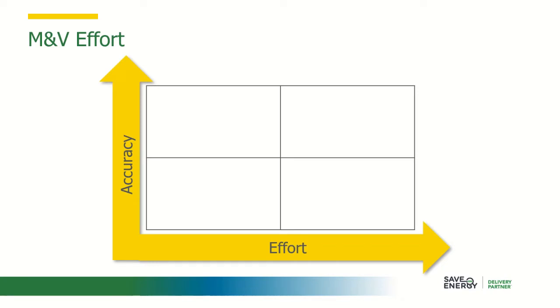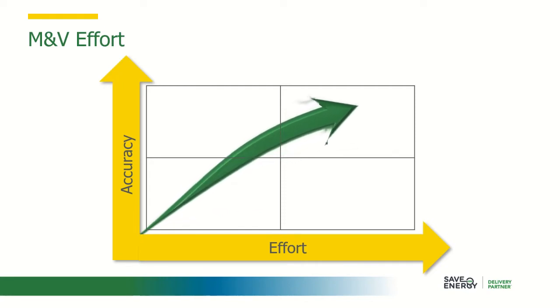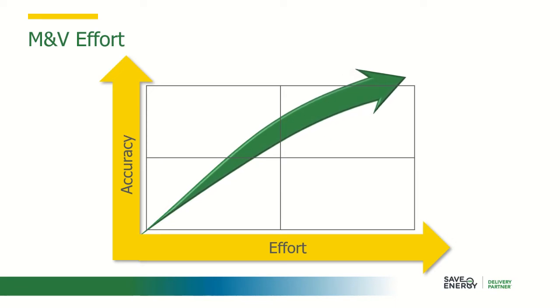The level of rigor included in your M&V plan depends on a number of factors. The complexity and accuracy of measurement and verification should scale with project size. Generally, the cost of measurement and verification should be small relative to the value of expected savings. If estimated savings are small or there is little doubt regarding project benefits, there may be no need to verify results other than to ensure the equipment is operating as expected. On the other hand, if the results will serve as the basis for financial transactions, either through energy performance contracts, incentives, or other agreements, then a higher level of rigor may be required.